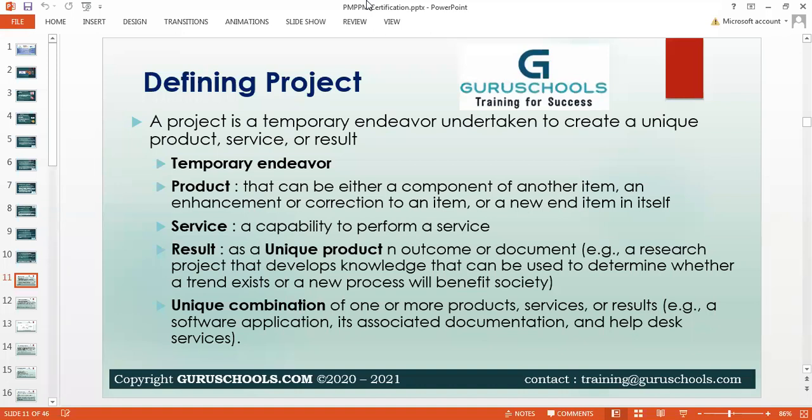So this should happen before the 10th of January. Whatever I have in my mind, I have to plan it accordingly. I need to make 10,000 pencils before 10 January, so I should try and create 1,000 pencils a day at least. And if I give some time for procuring the machines and raw materials, then I need to reduce that time and crash the construction at a later stage. So I might be building 2,500 pencils a day, so that on 10 January I can push this project to the market. Could you understand me?